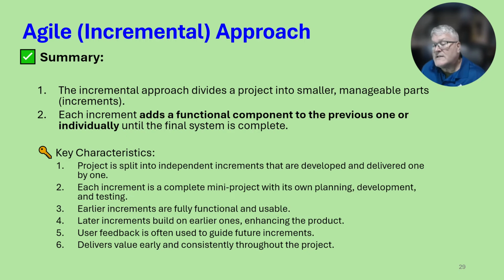Some key characteristics of it are: the project is split into independent increments that are developed and delivered one by one. Each increment is a complete mini-project with its own planning, development, and testing. Earlier increments are fully functional and stable. Later increments build on earlier ones, enhancing the product. User feedback is often used to guide future increments, and it delivers value early and consistently throughout the project.